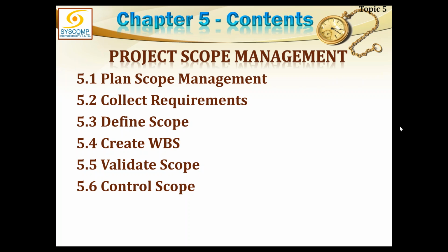5.1 Plan Scope Management is responsible for development of two management plans, Scope Management Plan and Requirements Management Plan. Scope Management Plan will be responsible for the management of the overall scope of the whole project, and Requirements Management Plan would be a subordinate management plan to the scope, but it is necessarily required because the requirements are highly dynamic. So how to manage the requirements, how to configure the requirements, how to amend the requirements, all these details are given in the requirements management plan. And requirements management plan will only be required when we are collecting the requirements.